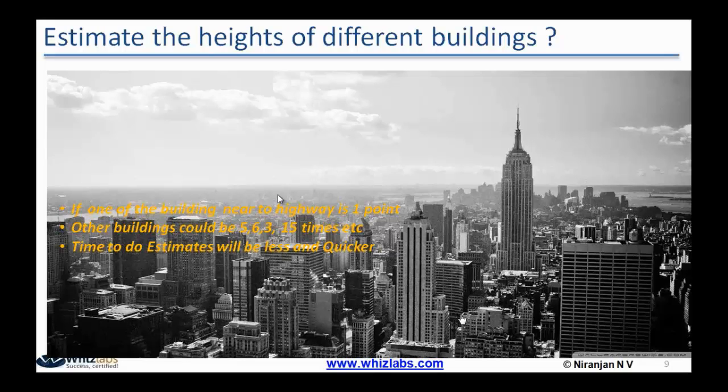Then assume it may come to somewhere between 5 sprints to 6 sprints. Then you don't have to worry about exactly determining whether it is 5.333 sprints or 5.44 or 5.45 sprints. You don't have to go to those decimals. The client will not be interested in that detail. What the client will be interested in is that you say either 5 sprints or 6 sprints. Okay. So let us say to be on the safer side, we say 6 sprints.